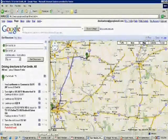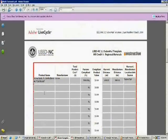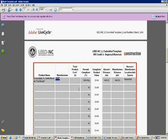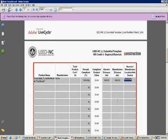Now I go to my regional materials submittal template that I access from my LEED Online Scorecard. As you can see here, I put the product name in as Acme Brick Fort Smith Blend 40 Old World, the manufacturer is Acme, the harvest distance is 304 miles, and the manufacturer's distance is 304 miles. The harvest/manufacturer location information source will be my submittal, which consists of the documentation I got from Acme Brick.